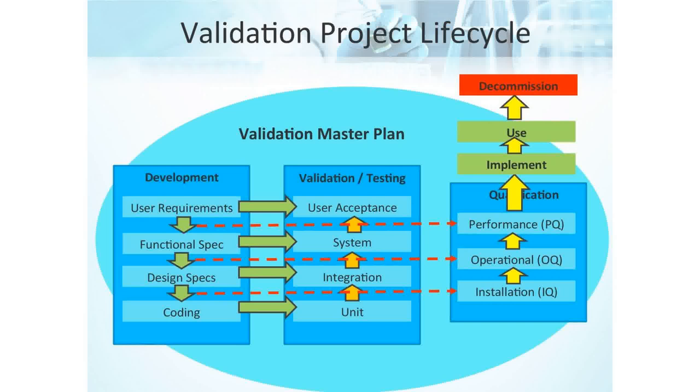But still, the fact that the system was alive and in use for any period of time is going to be of interest to the FDA. So too is the decommissioning of an existing system, and in many cases, documentation of a decommissioned system is required to be retained for a period of years. And here's where a records retention policy will come into play. As a project manager, you need to know what your records retention policies are and make sure that you involve the right people if you're decommissioning a system.